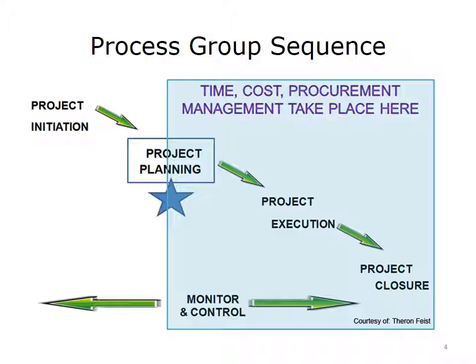The project team will decide if they will perform the work or if it will be outsourced. This is considered a buy versus build decision. A procurement plan is used by the project team to manage obtaining goods and services required to complete project activities.